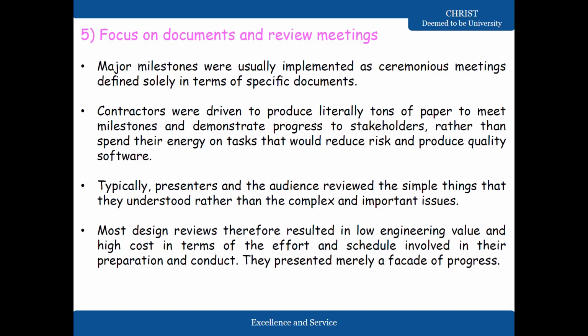Okay, you want to develop quality software, and it requires you to implement it correctly. Typically, presenters and the audience review the simple things that they understood rather than complex and important issues. So basically the audience does not understand these complex issues, and so documentation itself is not good. Most design reviews therefore result in low engineering value and high cost in terms of the effort and schedule involved in their preparation and conduct, and they presented merely a facade of progress.